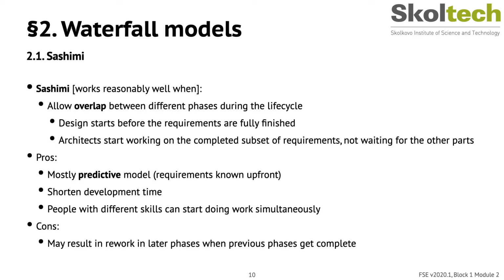But of course, if you start working on the next stage while you're still refactoring some things on the previous stage, this leaves you a possibility of rework, because if you have coded half of your application, and then the design suddenly changed, then you have to make adjustments in the development process and make adjustments in the testing process, and so on and so forth. So that may result in rework in later phases if previous phases basically get changed.